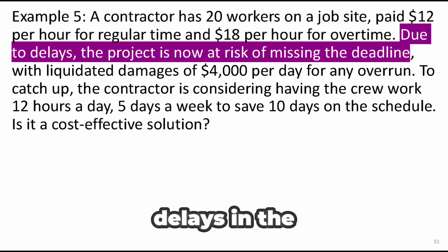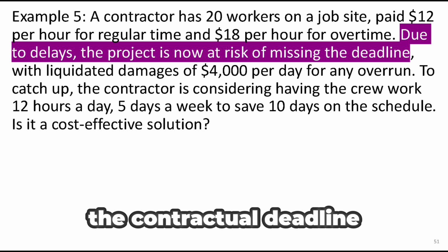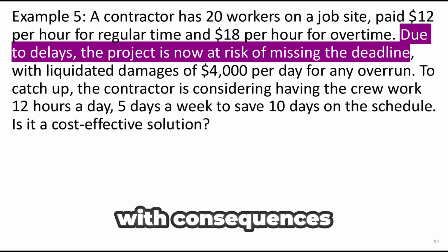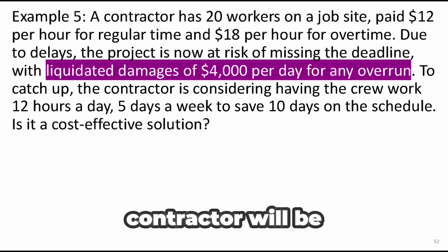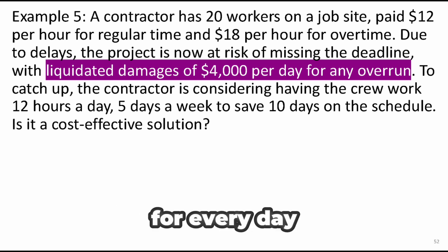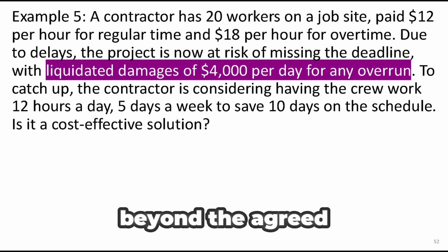Now, due to delays in the project, there's a serious risk of missing the contractual deadline, and that comes with consequences. Under the contract, there's a liquidated damages clause, which means the contractor will be charged $4,000 per day for every day the project goes beyond the agreed completion date.